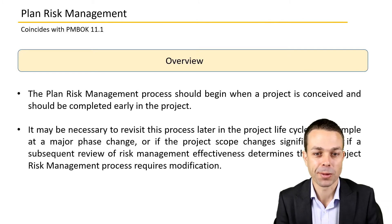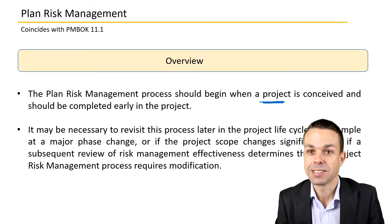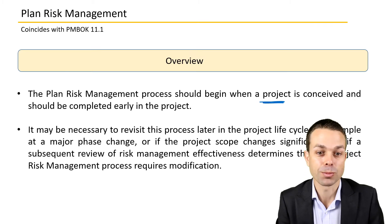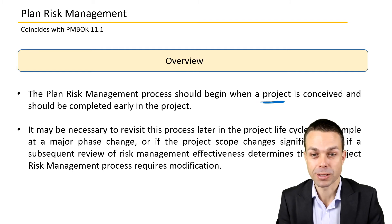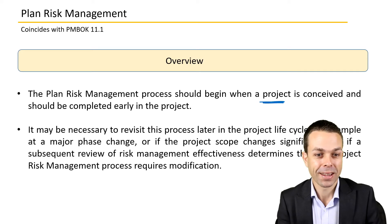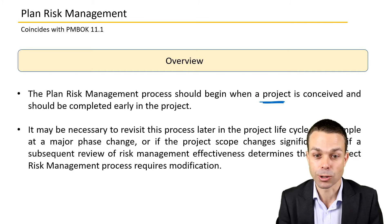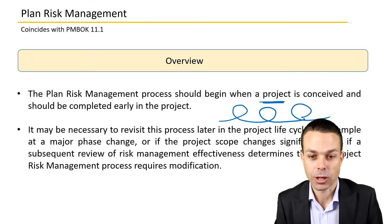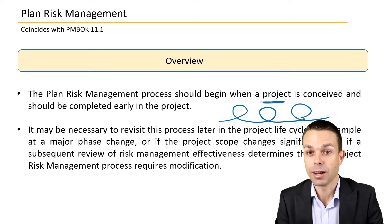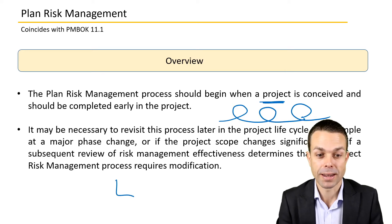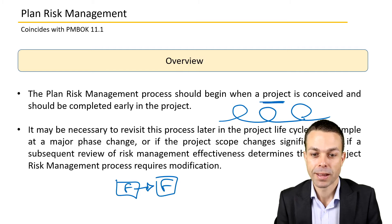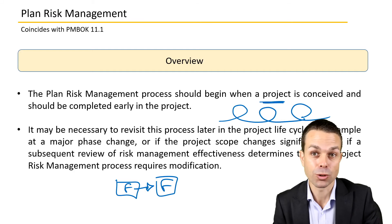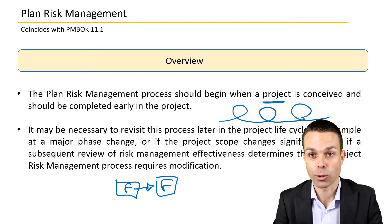Here's an overview of planning risk management. It should begin when a project is conceived — right at the very beginning — and should be completed early in the project, basically when we're creating our project management plan. It may be necessary to revisit this process later, as we might be iterating and adding bits and pieces as we go along. For example, at major phase changes: if we've delivered a feature and are moving on to another, we may need to revisit the risk. And if we need to take action to mitigate a risk, we may need to change our approach as we go along as well.